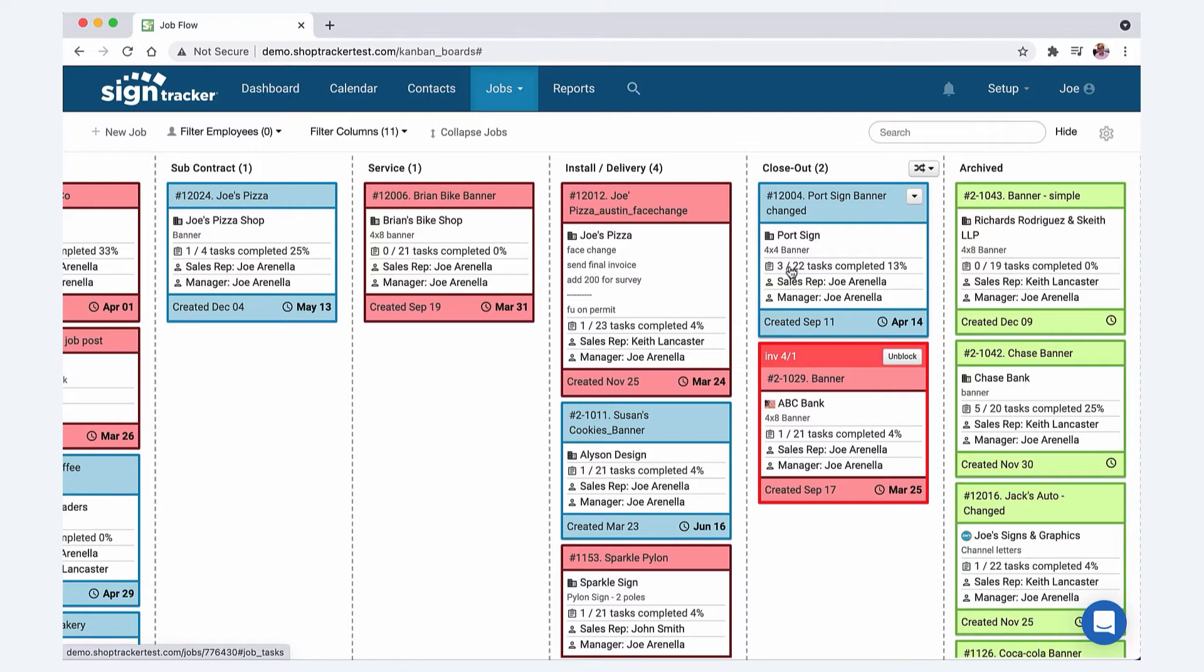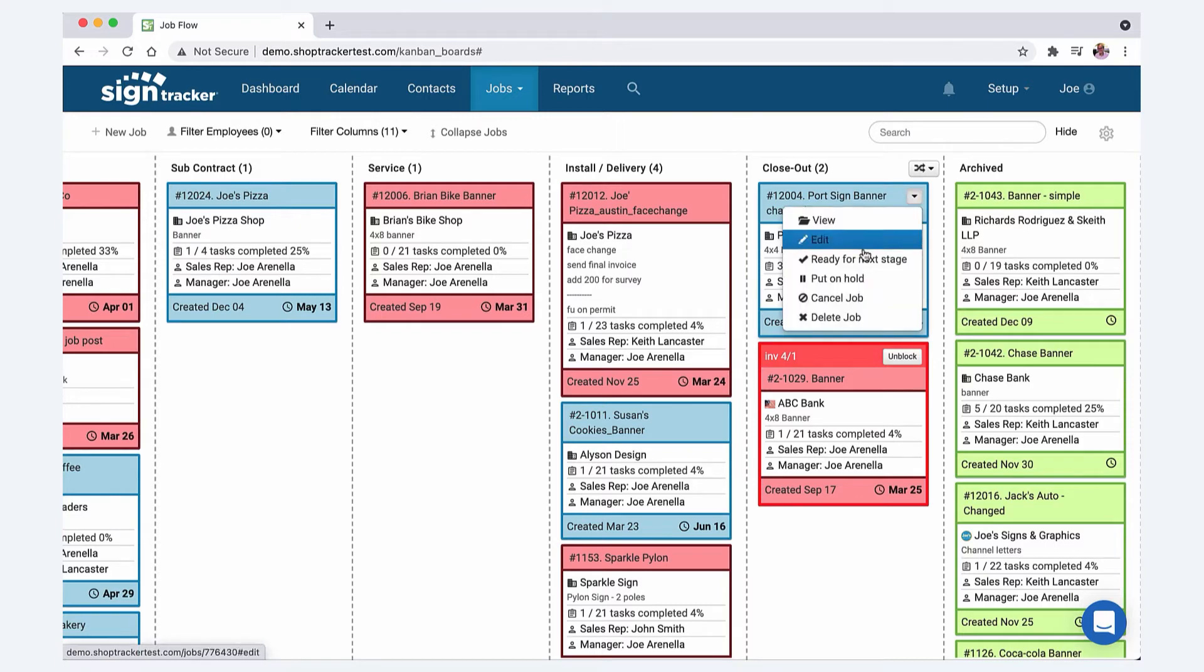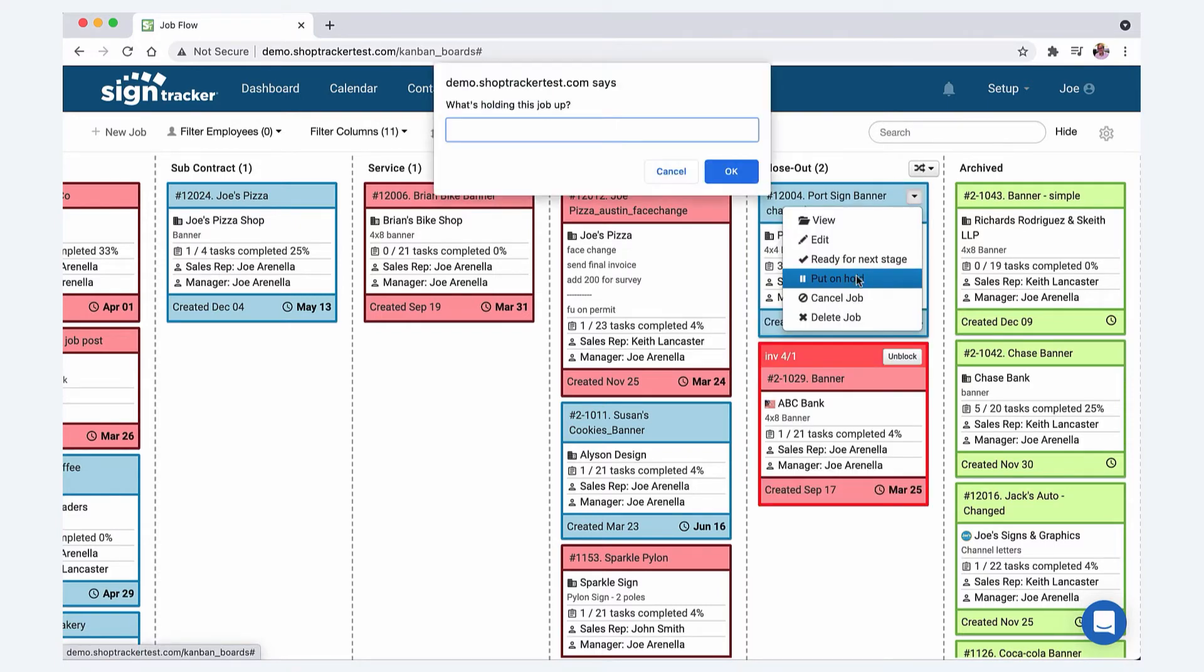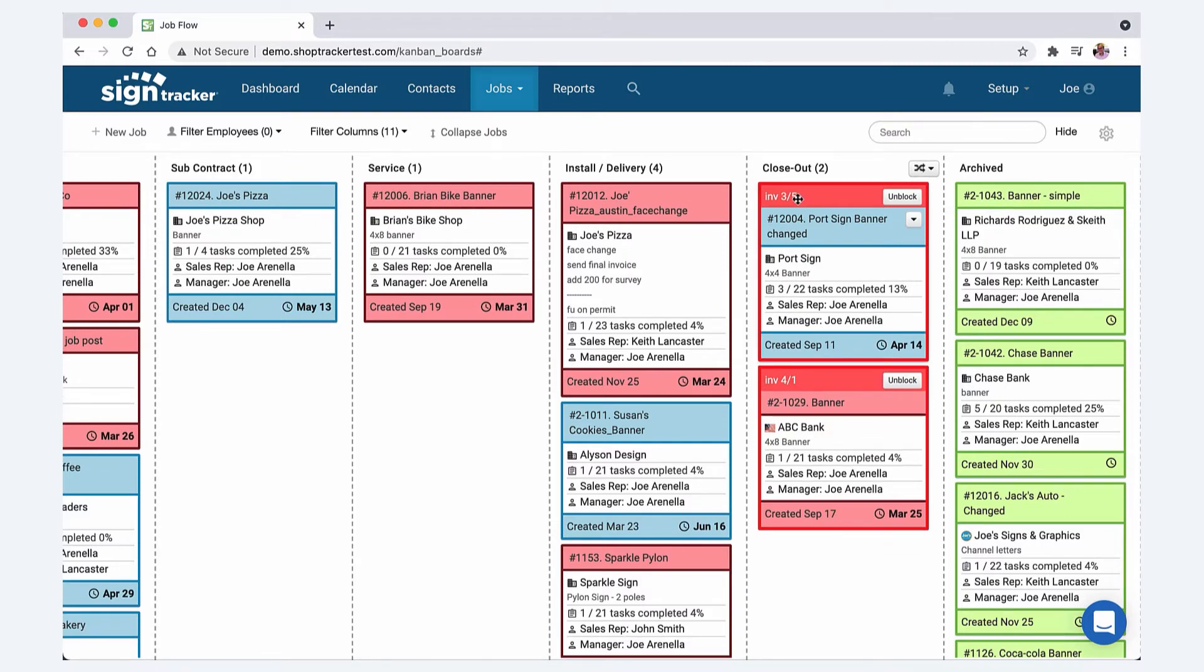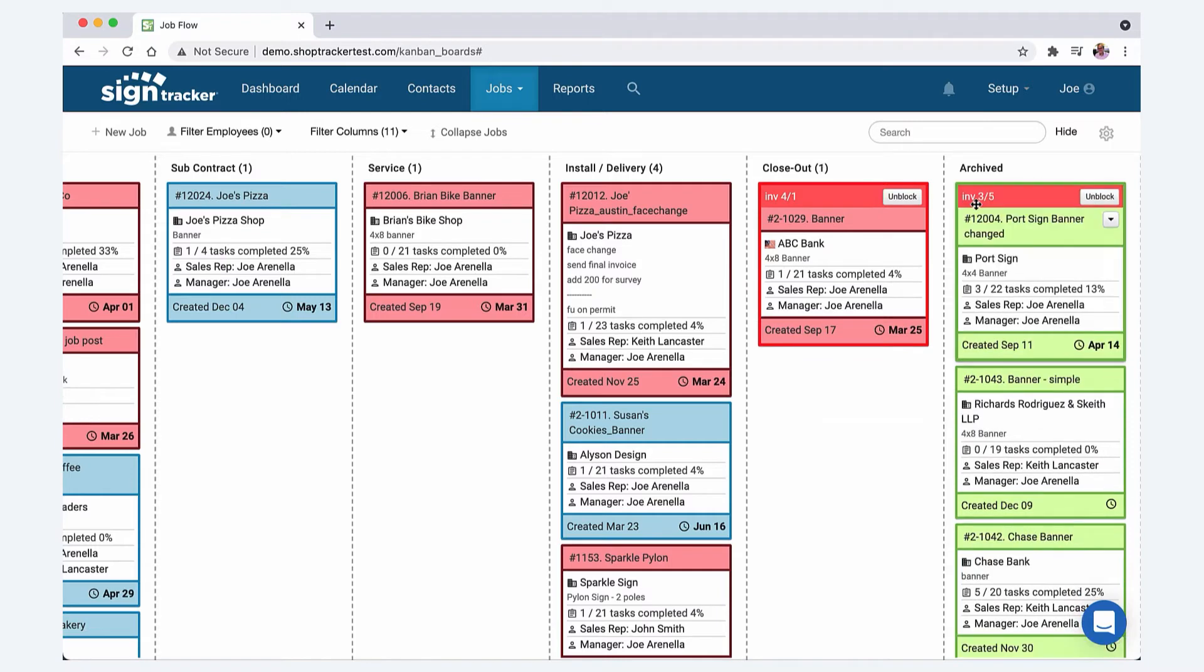At our shop, we would put the jobs on hold. You can put a job on hold by just simply clicking this, put it on hold. Then you can say why it's on hold, like invoice sent on 3-5, final invoice. So now it's on hold. When we would have our production meetings, the only person that was really able to move a job from closeout into archive was the accountant. Then you can unblock it from here.